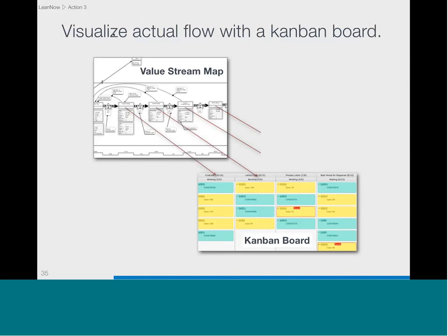And this is where, for those of you who work in Agile, you'll see quite a difference between an Agile Kanban board and a Lean Kanban board, because we won't have just a ready, working, done kind of model. These kinds of Kanban boards actually show the processes from the value stream map. An example I use here is actually 18 steps shown in the entire map. So we try to map all the critical processes.